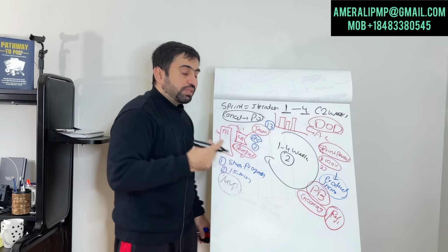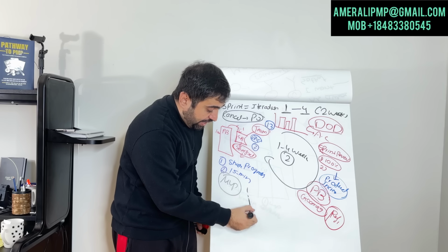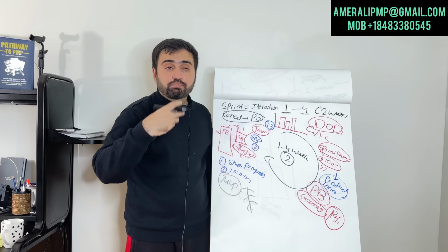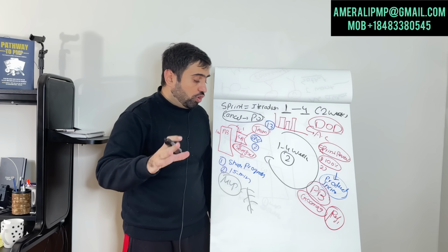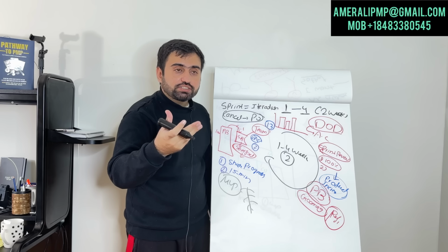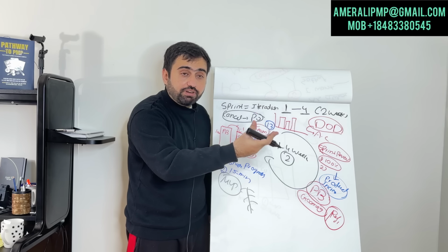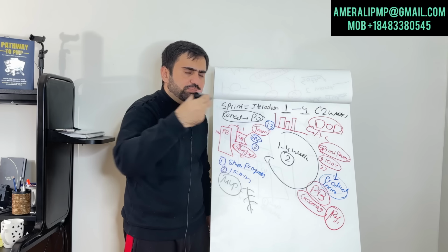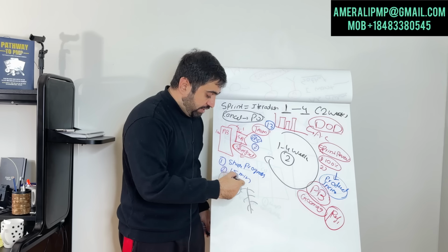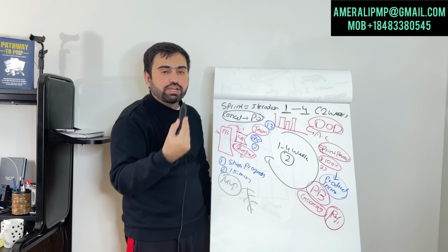MVP says to identify the most important thing, the backbone of the product, maybe the skeleton, and what the supporting requirements are, and make something and give it to the customer. Don't wait, give it to the customer. You have done something, provide value to the customer and look at it that way. We deliver the minimum viable product, and in every sprint or every increment we add to that minimum business increment. Whatever you have done, deliver to the customer, get the feedback, improve it.